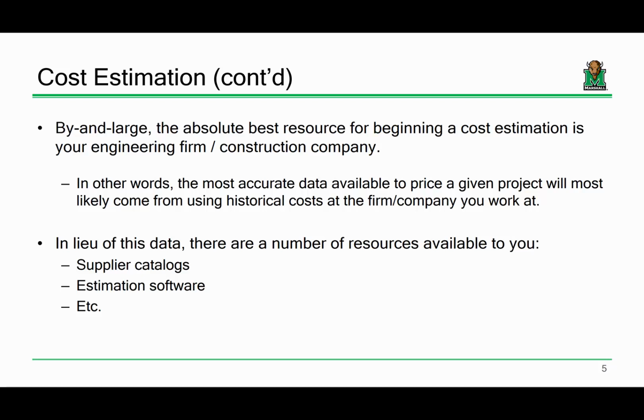They know the economics and the economy of the surrounding area like the back of their hand, and they're just going to have better tools than the general populace. So the most accurate data to price a project is going to come from historical information with your company. I want that to be said right off the bat.